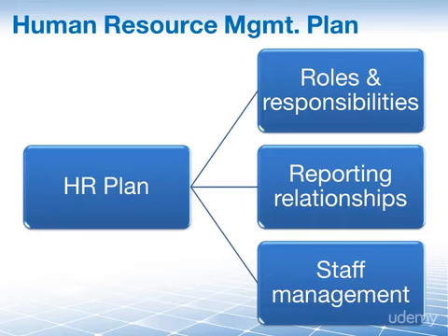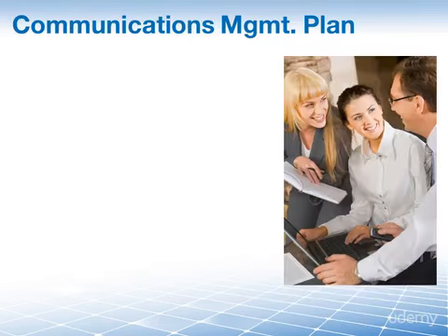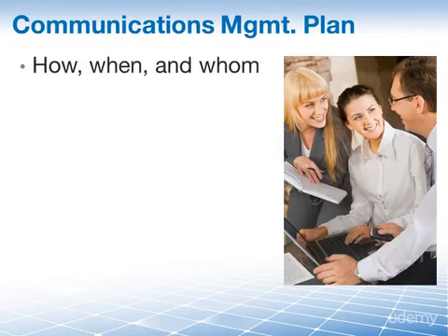The idea right now is just to show you that all of these items become integral parts of your overall project management plan, and therefore they become, shall we say, instructions on how you manage your project overall. And talking about instructions, the communications management plan is full of them. It describes how, when, and by whom information about the project will be administered and disseminated. Again, it doesn't talk about the communication itself.